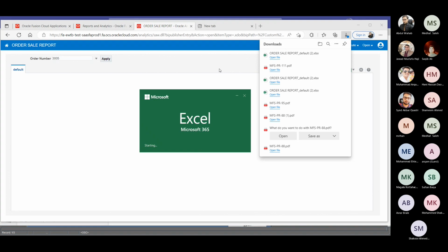Every customer, like we have a contract with the Red Sea Mall, we have contracts with other customers, they have some margin. They have already written in the contract that whenever we sell any item to this customer, we have some margin. There is 10% margin, 7% margin, 5% margin. So whatever the margin is, it is showing you in the report. But what you will do, you will just enter the formula and calculate the sale price by your own hand. Why is it not opening?